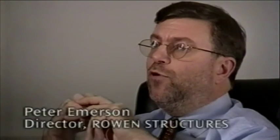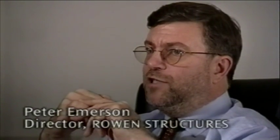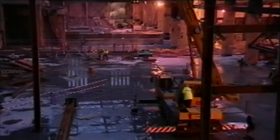The works that are being carried out by us to the retaining wall are quite interesting and represent a fair amount of risk. The fact that we're cutting pockets onto the top of a 50-year-old concrete wall and drilling through that wall to provide restraint is definitely something that's out of the ordinary. And again, I suspect not too many people, particularly steel fabricators, have been involved in that line of work.